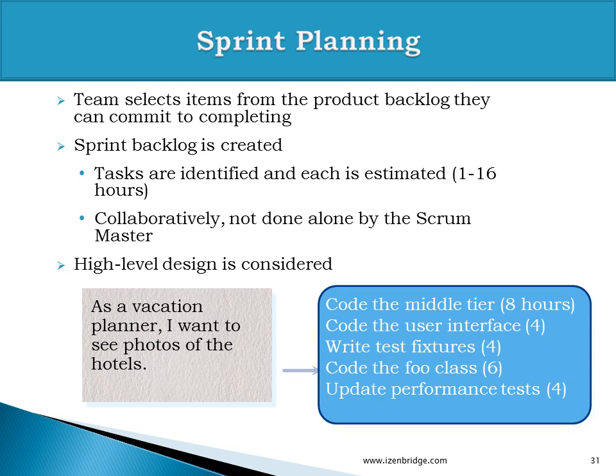There could be another way where the team evaluates each and every product backlog item and commits whether they can do it during the upcoming sprint or not. So there could be a commitment-driven selection, or a velocity-driven selection, and once that selection is done, the sprint backlog gets created, where the team breaks the items into engineering tasks and gives estimations.